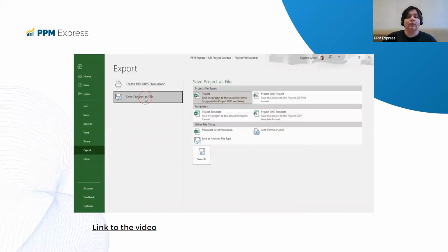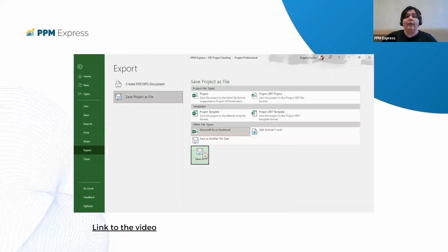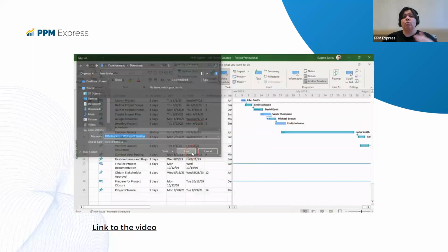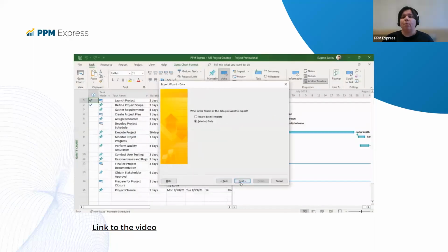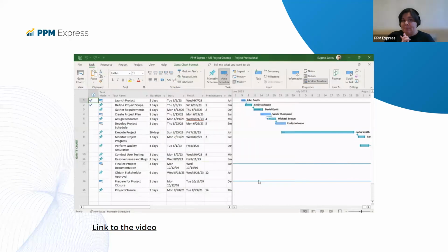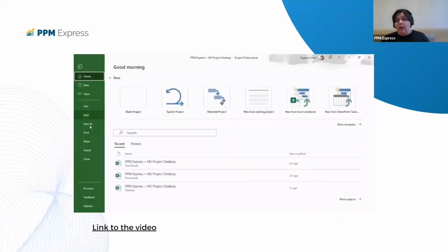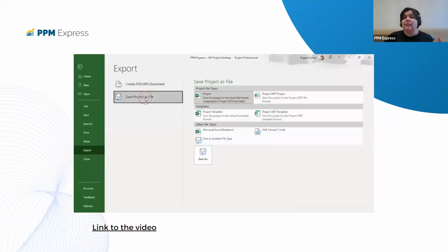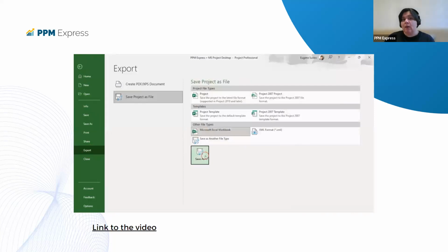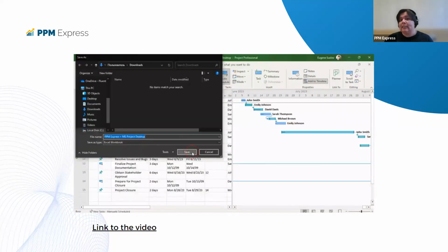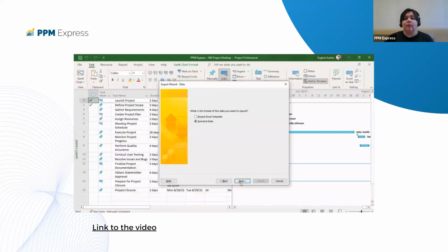Then you will be presented with an export wizard where you should just go through the steps and you will be prompted to perform the task mapping, resource mapping, and assignment mapping steps. At the end, verify the export map layout and choose Finish. The resulting Excel or CSV file can now be shared with the team members as necessary or imported into another project management tool.